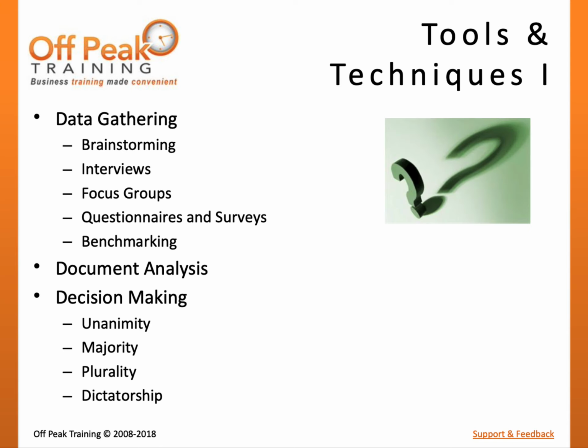The first group of tools and techniques we will discuss focuses on stakeholder engagement. Interviews can be used as a formal or informal way to ask stakeholders about the desired features and functions of project deliverables. This may be one-on-one or with small groups. Focus groups are a way to collect feedback about product expectations by bringing together stakeholders for discussion led by a trained moderator. This conversation may lead to topics not addressed in an interview.